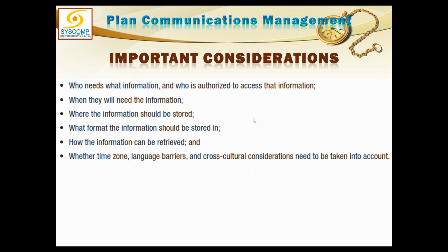There are some important considerations here. You must understand clearly and you must specify these things in plan communication, that your plan communication must provide guideline and information about who needs what information, who is authorized to access that information. I'm not saying you write down the names. These questions must be included in your guideline and the answer to these questions must be provided in an arbitrary